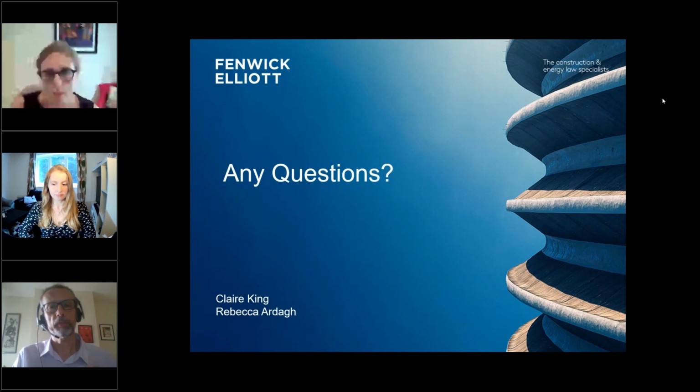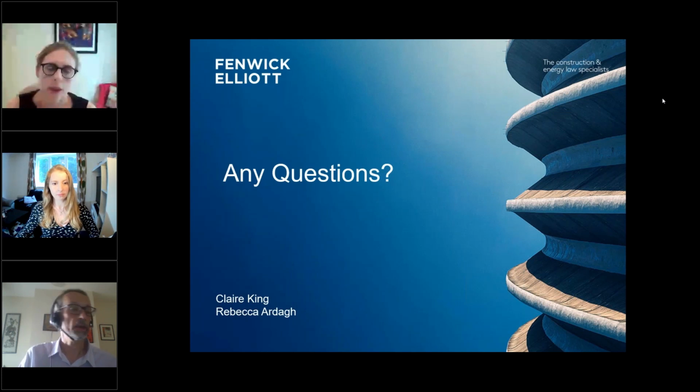Yeah, thank you. Just to repeat what Claire was saying, because you were breaking up a little bit on my screen, in a similar way to Rebecca talking about the force majeure notices, if under 8.9 you want time or money, you have to go through the 20.1 process, and therefore you're going to be caught by the condition precedent.